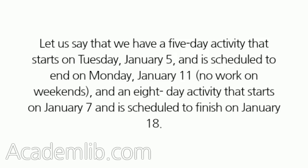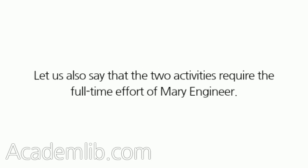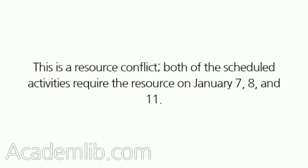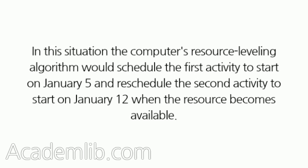Let us say that we have a five-day activity that starts on Tuesday, January 5, and is scheduled to end on Monday, January 11, with no work on weekends, and an eight-day activity that starts on January 7 and is scheduled to finish on January 18. The two activities require the full-time effort of Mary Engineer. This is a resource conflict — both of the scheduled activities require the resource on January 7, 8, and 11. In this situation the computer's resource leveling algorithm would schedule the first activity to start on January 5 and reschedule the second activity to start on January 12 when the resource becomes available.